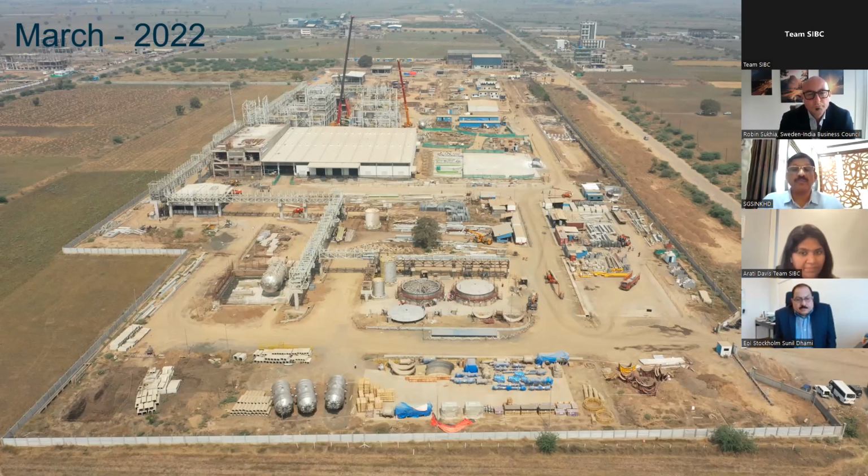So the focus was to build that system with the civil contractor, and we built it, and we gave them specific training on the site itself, taking rounds and advising them. So this type of thing helped the civil contractor to follow that, and then the top management, including the CEO, also had a discussion with the civil contractor owners, and we clearly communicated our interest, and support from their top management was also there. And considering that we didn't want to lose this contractor during the lockdown, we asked them to continue at whichever pace they had, with whatever people they had, and later they could bring more in.